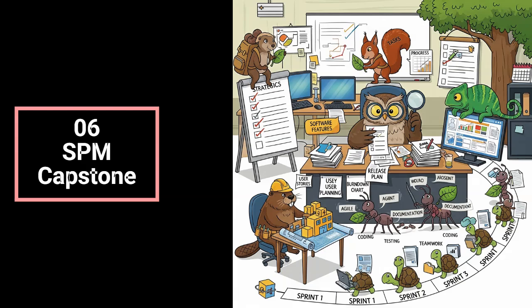Okay. And the lessons they recommend focus on, well, what makes a good user story? Right, like is it clear, testable, small enough? Yeah, all those INVEST criteria: independent, negotiable, valuable, estimable, small, testable. And also, how to deal with requirements that are just vague, ambiguous. Because nobody wants that. Right, leads to confusion. Totally.